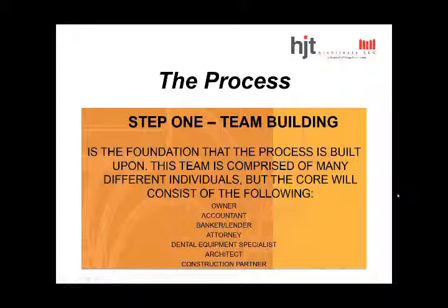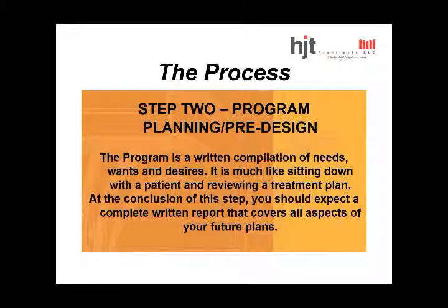Step two of the process is the program planning pre-design, which Han had gone through some components of. The program is a written compilation of needs, wants, and desires. It's much like sitting down with your patient and reviewing a treatment plan. At the conclusion of this step, you should expect a complete written report that covers all aspects of your future plan, i.e. it becomes the roadmap. Without this, you're basically starting down a path without the roadmap. It might be okay for a weekend trip, but definitely not a good idea when you're dealing with brick and concrete and steel.